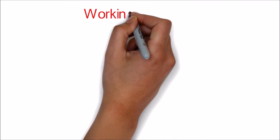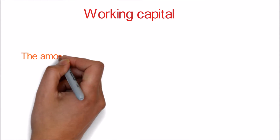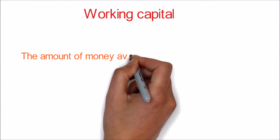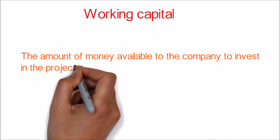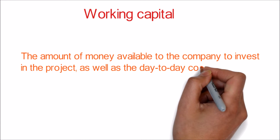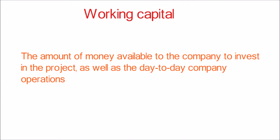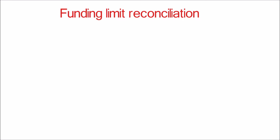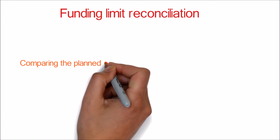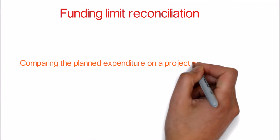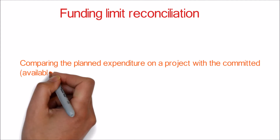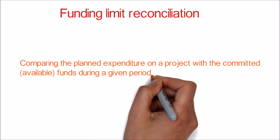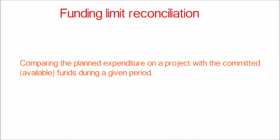Working capital is the amount of money available to the company to invest in the project, as well as the day-to-day company operations. Funding limit reconciliation involves comparing the planned expenditure on a project with the committed funds during a given period.